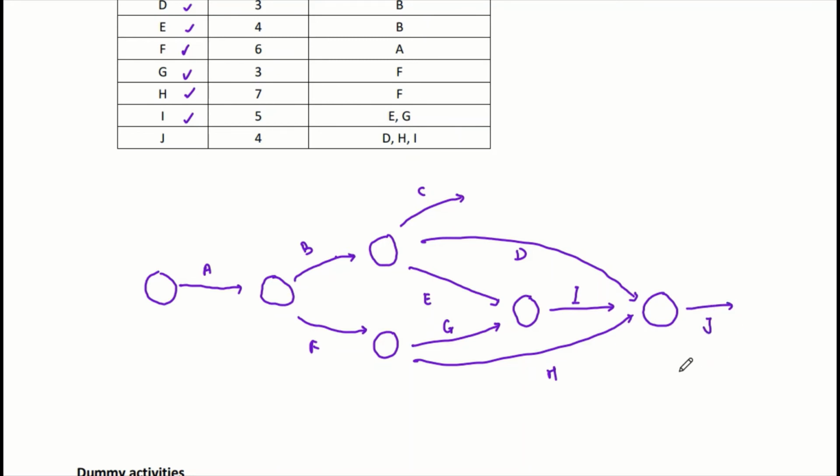Okay, so now you have already completed it, right? Then you can observe which ones you didn't connect, which you didn't draw the checkpoint for yet. Which means that everything has a continuous structure here. So the only two tasks without a next task are C and J. Am I right? That indicates that those will be your ending activities. So in this case, what do you want to do in the last step? You just connect these to the end.